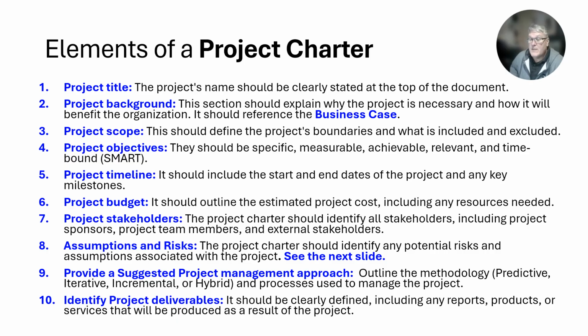There ought to be a preliminary project budget. There should be the stakeholders identifying who's involved internally and externally, and who will be impacted by the outcome of the project. There needs to be a discussion of assumptions and risks, and I'll go into those terms a little bit more, what an assumption is. It needs to provide a suggested project management plan, and outline whether they're going to use a waterfall approach, incremental approach, iterative approach, or maybe even a hybrid approach. And then again, identify the project deliverables, how they're going to be measured, and their outcomes.